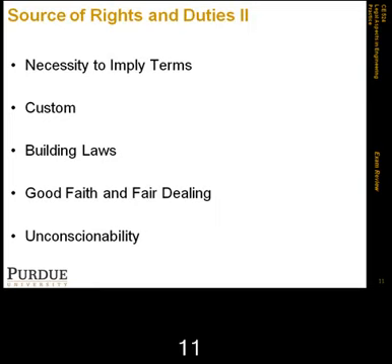Again, common law did allow contracting parties to decide the terms of their contracts, but the UCC broadened the unconscionability doctrine, and it created the obligation of good faith and fair dealing, which limits the conduct of parties. The doctrine has been rarely used to invalidate clauses in construction cases, except for cases where there was an exculpation or indemnification clause, where someone is trying to get out of a risk or responsibility that they should carry.